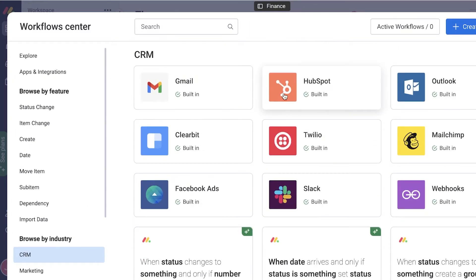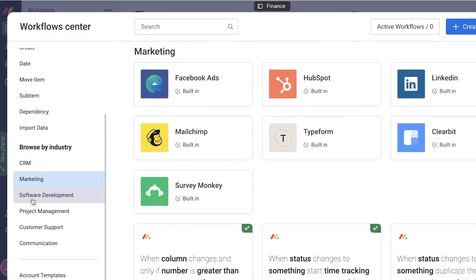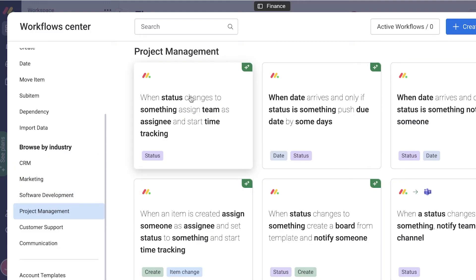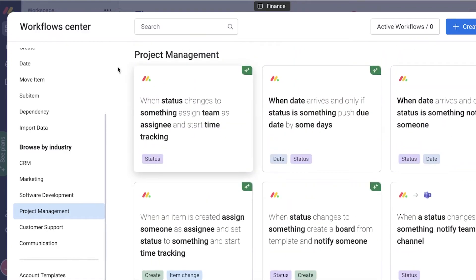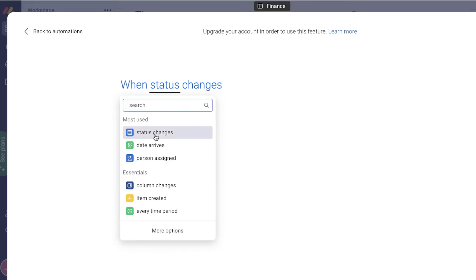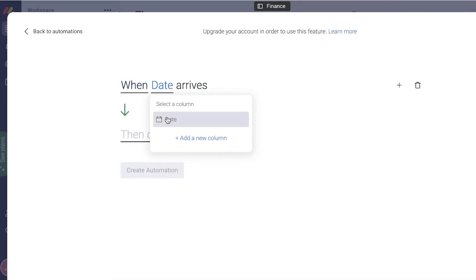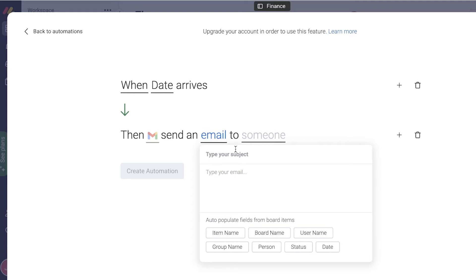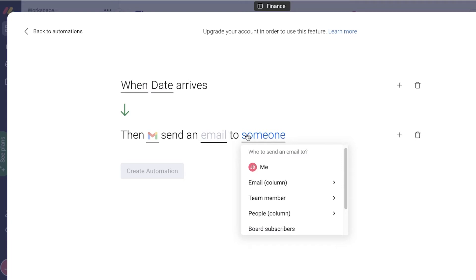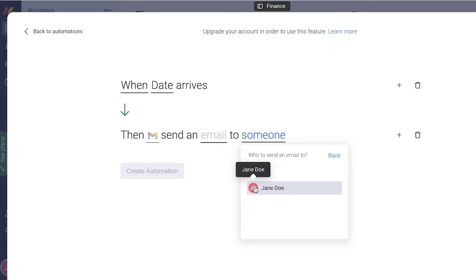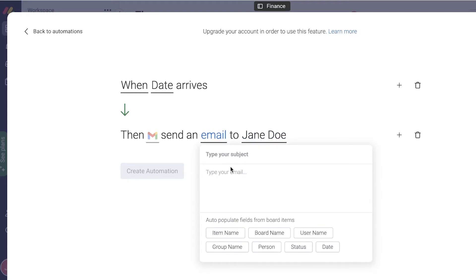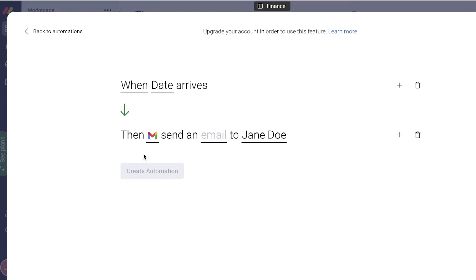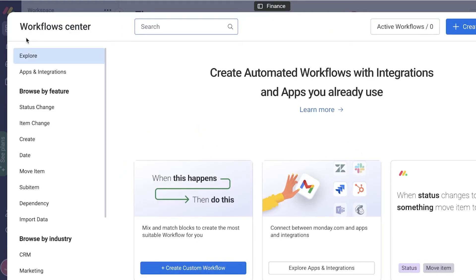In terms of useful automations, you have things like: when a status changes to something, assign a team. You can click 'Create Custom' and set up a custom automation — for example, when a certain date arrives, send an email. You enter the email content, who it should be sent to, a specific team member or yourself, and choose the account you want to send it from. Then click 'Create Automation' to finalize.